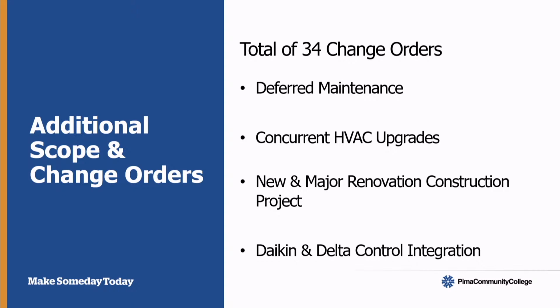Identifying some of our deferred maintenance, we also had HVAC deficiencies that were identified, a total of 447 deficiencies that had to be addressed as well to bring up all of our units ready and capable to meet this integration that we were moving towards. Part of those repairs were handled through change orders and used contingency funds.